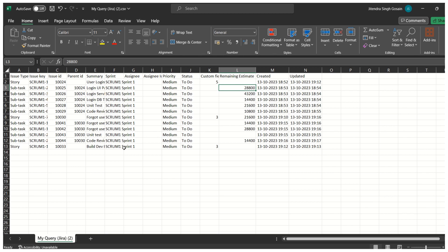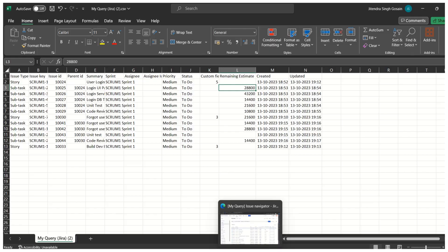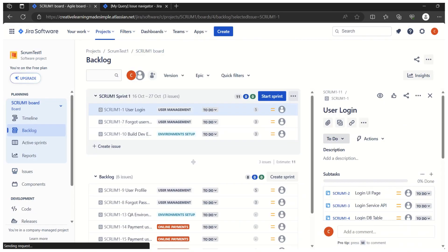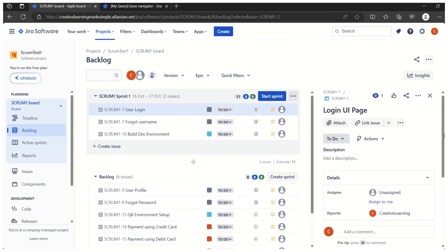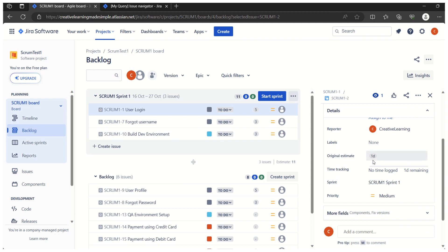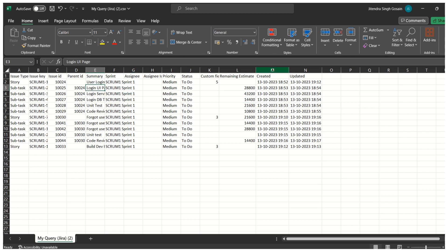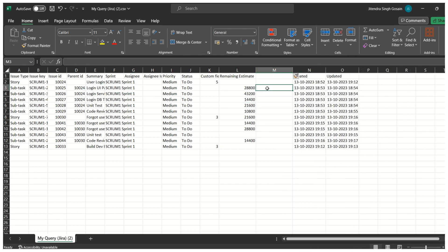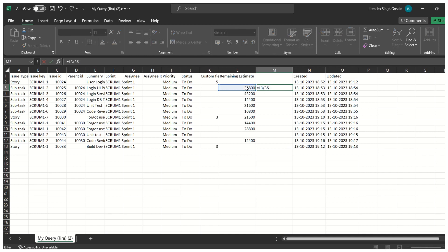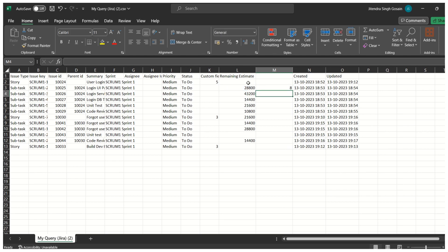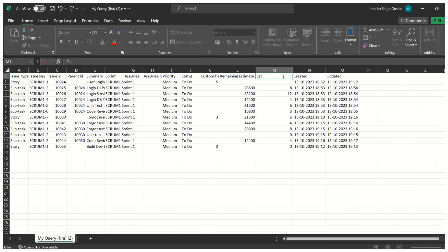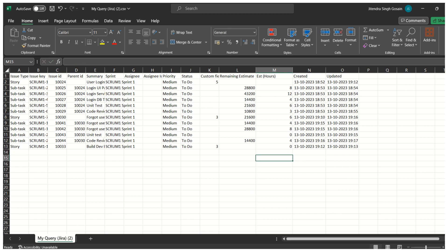To show why estimates appear in seconds: clicking on User Login and then 'Login UI Page' shows that task is estimated as one day. Back in the spreadsheet, we can create a formula to divide the seconds value by 3600 to convert it into hours. So that's how we can export user stories and their child items, with time estimates converted to hours.